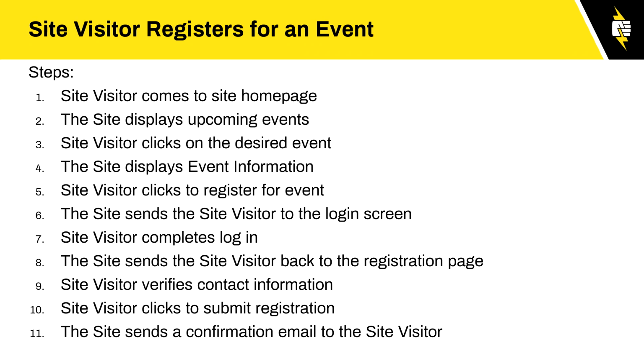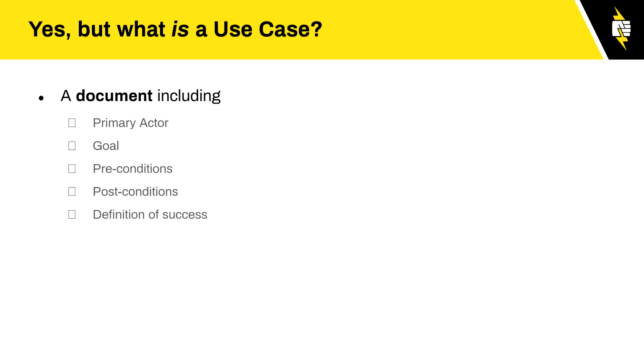So it's actually that whole separation that we all want of did the developer actually deliver versus the test. Having your developers write your tests means that they're always going to pass, because they know what they did and they know what passes. This kind of gets rid of that.